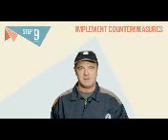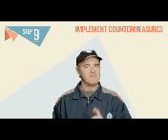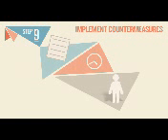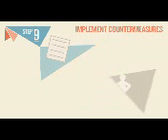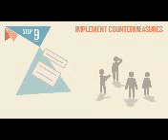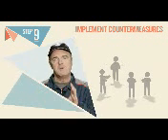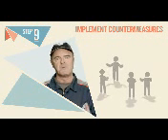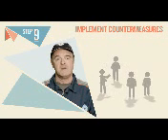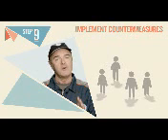Step 9. At last it's time to implement the countermeasures. Be sure to create and then follow a strict plan for this. The plan should include not just a list of actions, but also timings and, crucially, the name of the person who is responsible for each action. As a rule, it's better to do one thing at a time, and that way you know which measure is yielding which results. Also, note that success often depends on the empowerment of the team. They have to own the countermeasures themselves in order to be motivated to really ensure it works.